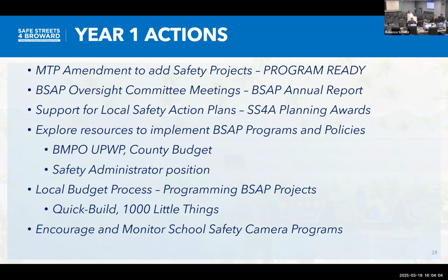Oh, there may be also, and Carrie stepped out, but there may be some of these projects that are smaller and that aren't on the federal aid network. So as we've talked about some of the improvements near schools or some of the improvements in the neighborhoods based on a high frequency of KSIs, the local roads, a lot of them are not on our federal aid network. So we can't fund them necessarily with our MPO federal funding. But SU dollars, thank you. Yeah, as I realized as I said that, but there might be some other resources.